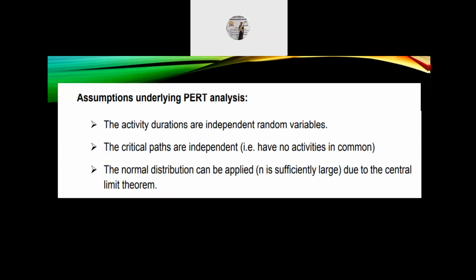Next, assumptions underlying PERT analysis. The activity durations are independent random variables. The critical paths are independent. The normal distribution can be applied due to the central limit theorem.